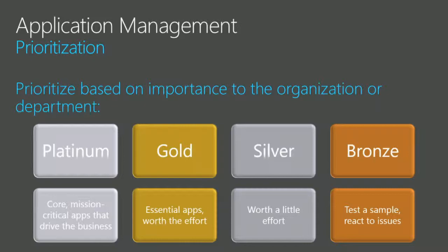Gold apps, yeah, they're probably worth doing a fair amount of testing, but maybe not a fully extensive, well-documented test plan. Maybe they're just going to be run through a few of the key functions to make sure that they work. For silver ones, maybe it's just a sanity test, a smoke test. Does it install? Does it launch? Does it print? If that works, all right, that's good enough.